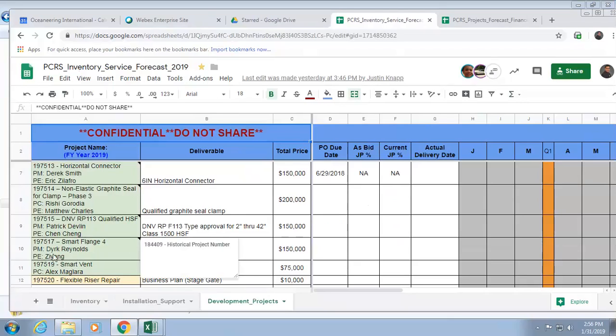One of the things we'll have to do: he has already set up the project folders. I hope the end of the month files are dropping in. They're already in there. So our first task, for all the NPD projects, would be to figure out the WBS. You take the budget allocated to you, see what's left, and how the dollar value is going to be distributed. Now, if your budget is going to be needed more or less, show that. But that's your first cut at the end of the month file.